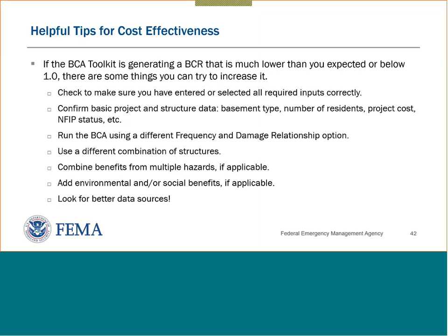For example, if using historic damage doesn't work, and you can use model damages based on the project type, do that. Or use professionally expected damages. But again, you'll need documentation to support whichever methodology you use.